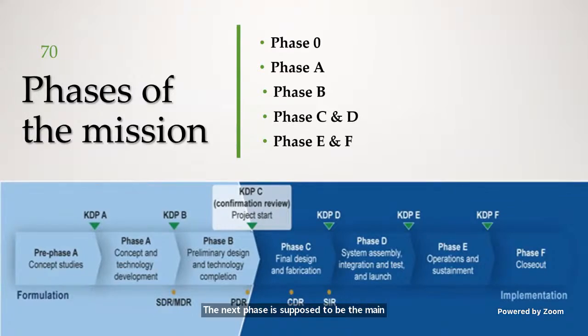The main purpose of phase B is to convert the conceptual idea from phase A into a prototype model, upon which further investigations can be performed to confirm the feasibility of the concept before building actual space-qualified hardware. The initial prototype model is sometimes referred to as the engineering model. It can use non-space-qualified materials or procedures. It isn't constrained by either weight or size restrictions, but it should prove the functionality of any special components or materials that would eventually be incorporated into a flight model. So this phase includes technical modeling, designing, simulations, and low-level feasibility.